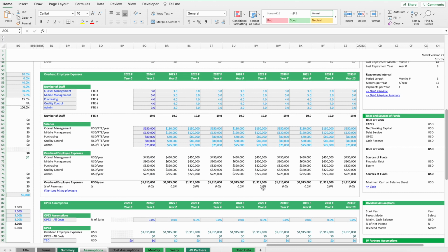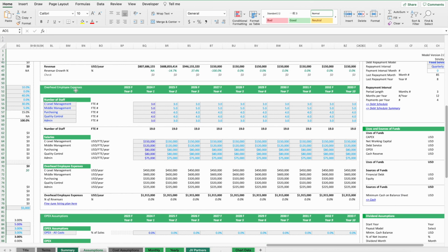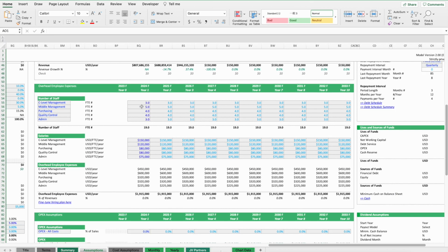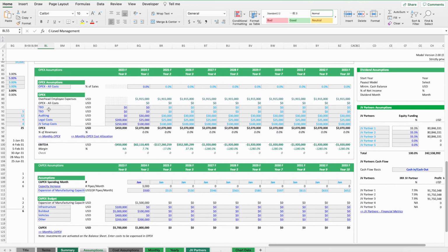They might need to hire people on a permanent basis, which cannot be allocated to each and every single EPC contract. So there is a section in the model which allows exactly to do that. So you can here simulate the costs for hiring a different number of staff at different cost levels, and also operate a budget for operating costs.